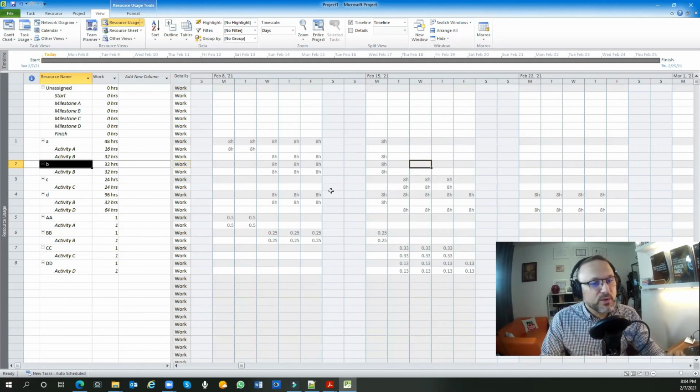Be careful, always follow your resources, because you could be in schedule, but availability of your resources is limited, then your activity will be delayed. Resources are important to be prepared. As a project manager, you must check all the availability of your resources and ensure that the resources are available at a certain time and they are ready before they start. Means they are informed, they are well trained, they have prepared themselves, they know what to do. Once they start, they start.